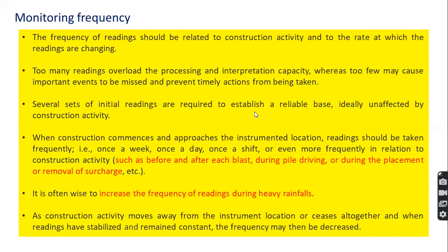Then it is always recommended to take readings after some disturbance like a blast or a heavy rain or an earthquake. So after some disturbance to the construction activity, it is always recommended to take monitoring readings immediately after the event.